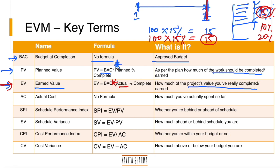While doing the work, there is cost associated — raw material, team man-hours, and so on. This is termed Actual Cost (AC). In exam questions, you'll be given how many hours have been spent or how much money has been spent while doing this work. AC is how much money you have actually spent so far. There is no formula for AC — it comes from the ground; it's given to you by your team.